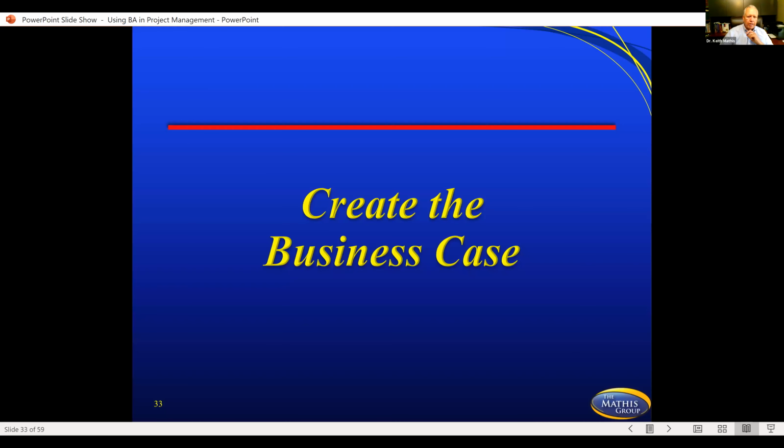Okay, so creating the business case. Let's go to the very beginning and assume the BA does have the role of helping create or doing the analysis of the business case. Now remember, the responsibility of this would probably be the project sponsor, because they're going to represent management. But the analysis would be the business analyst. Now you might be in an organization where the project manager does the business case. That's fine. That's how your organization does it. But in general, the business case is done by somebody higher than the project manager, and then the project manager might be brought in to help with the charter, because they're appointed a lot of times in the charter.